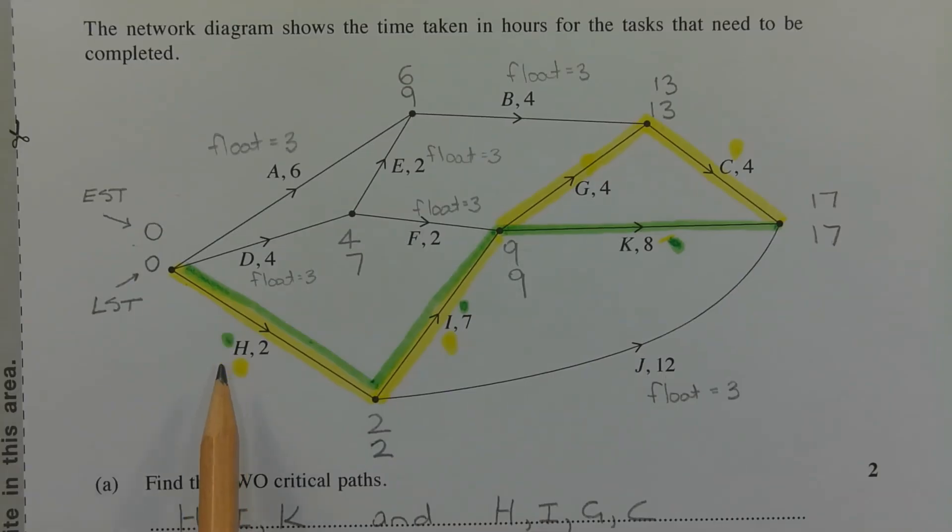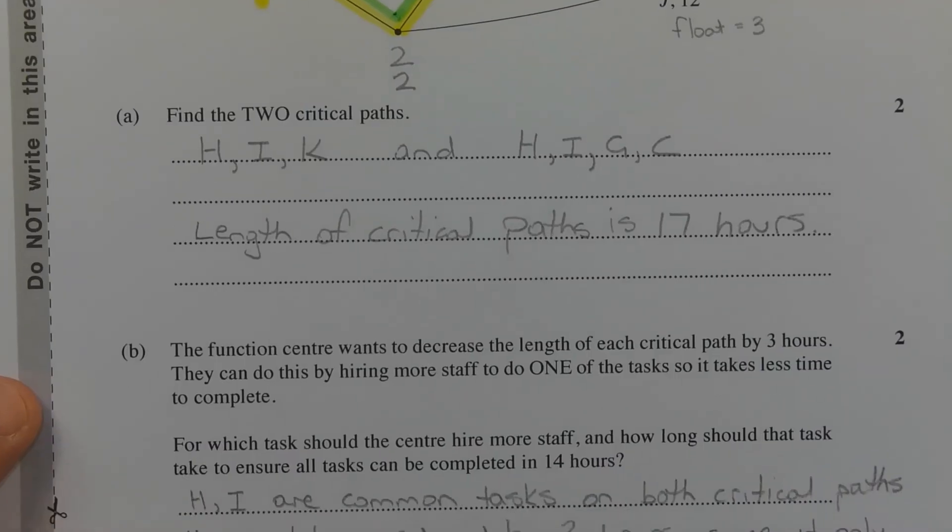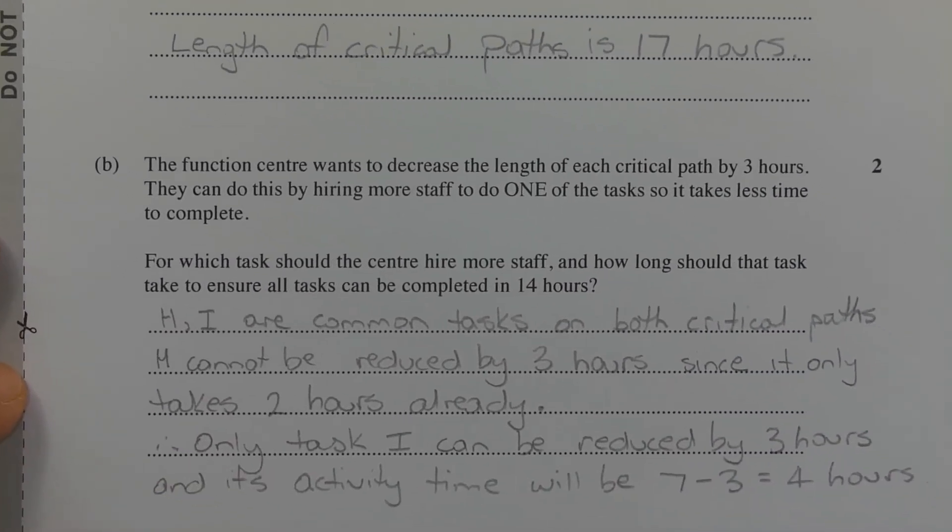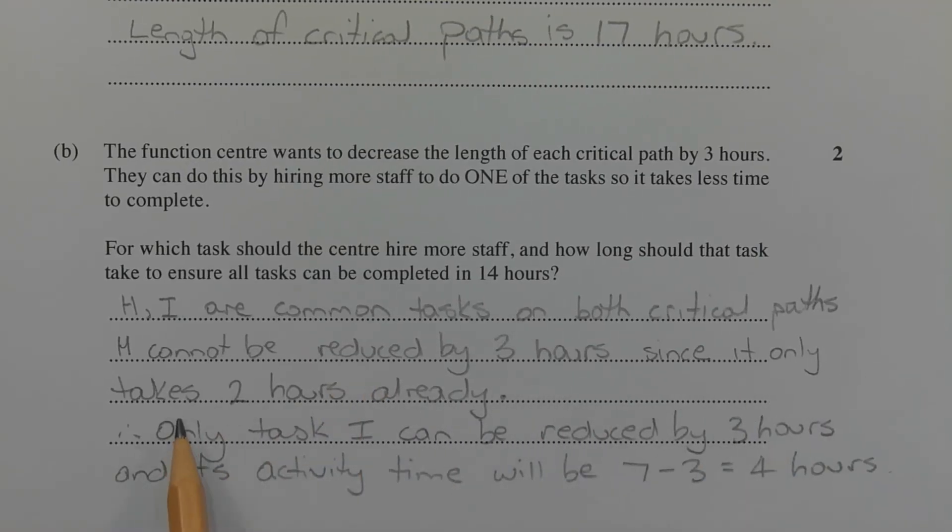So if we choose activity H, well, it's two hours already. We cannot reduce that by three hours. In other words, if we do that, it'll take negative one hours, which doesn't make any sense. So the only task left that we could choose that would reduce both critical paths by three hours is activity I or task I. In my answer, this is what I wrote as my sample solution. H, I are common tasks on both critical paths. H cannot be reduced by three hours since it is already two hours. And only task I can be reduced by three hours, and its activity time will be 7 minus 3, which equals four hours.